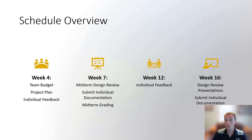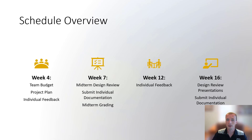You're also going to turn in a project plan, usually in the form of a Gantt chart — a listing of all the tasks you think you need to get done through the semester to reach your end goal, who's responsible for each of those tasks, and when you think they'll get done. The last piece is some individual feedback on your notebook, where your TA will let you know if you're on the right track with respect to the work, accomplishments, and reflections you're documenting to that point.